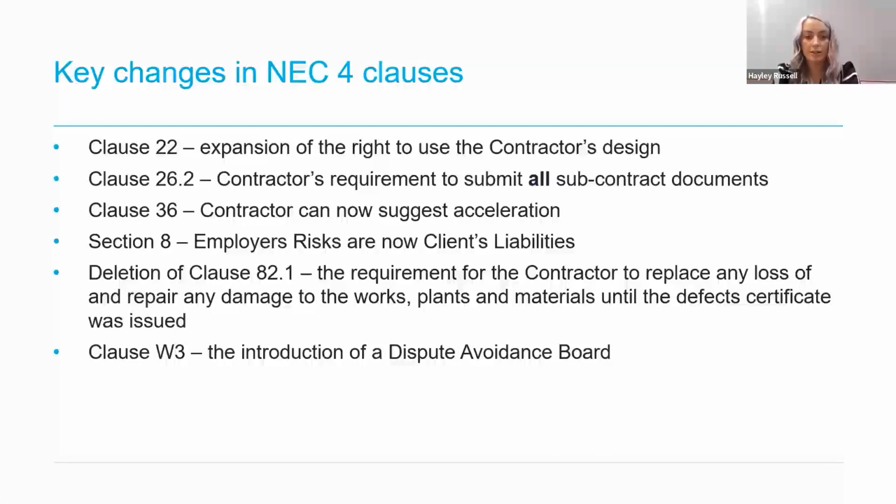A further key change in this section is that the two-way general indemnity in NEC3 has been removed and replaced with a more tailored statement of each party's particular liabilities. While this is an improvement from NEC3, we still don't think NEC4 addresses the insurance industry's concerns about risk liabilities and insurance provisions within NEC. For major insurance projects, we still feel that it is critical that specialist insurance advice is taken and, if appropriate, that Z clauses are added to the contract.